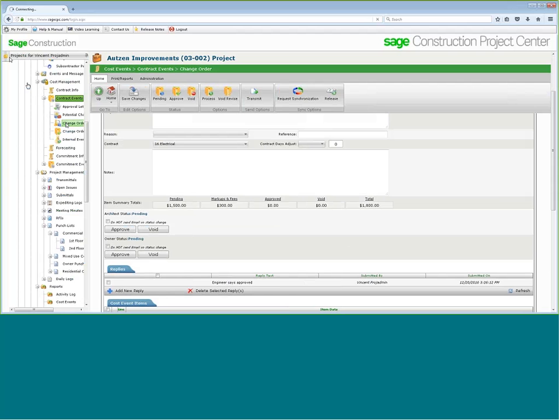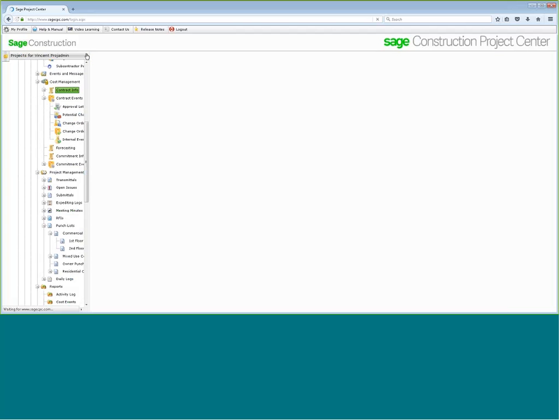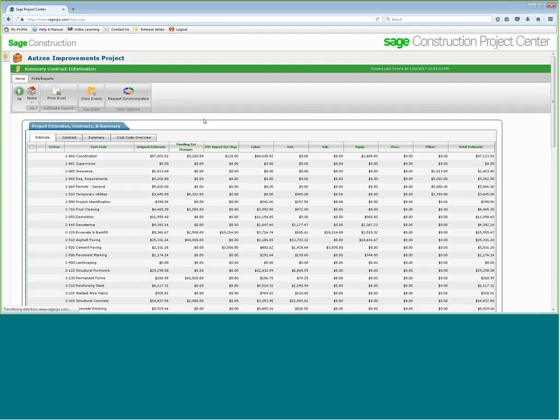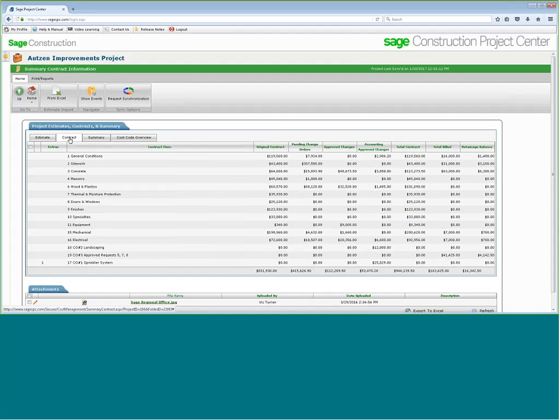On the job costing information side of things, we also give you direct access into your Sage accounting so that you can always pull up, as a project manager or superintendent, and see, what is my estimate? What have I been budgeted on? So as I'm going and doing my walkthroughs on my job, I can make sure I'm not going over budget, that I'm staying within my contract on the billing side of things, and seeing what's been billed and what retainage is certainly sitting out there.